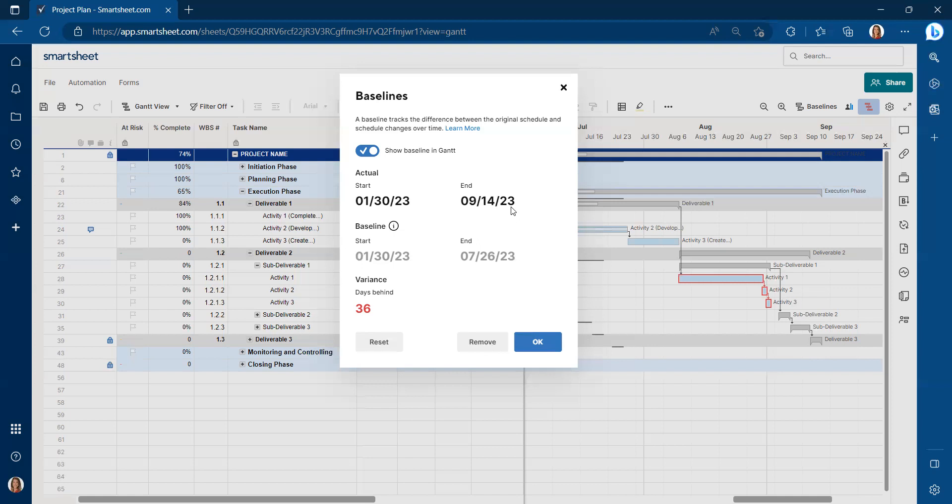For Smartsheet, you can simply remove or reset the baseline, which is important because if you remove or reset, you're no longer going to be measuring against your previous plan. You're going to be measuring against your current plan.